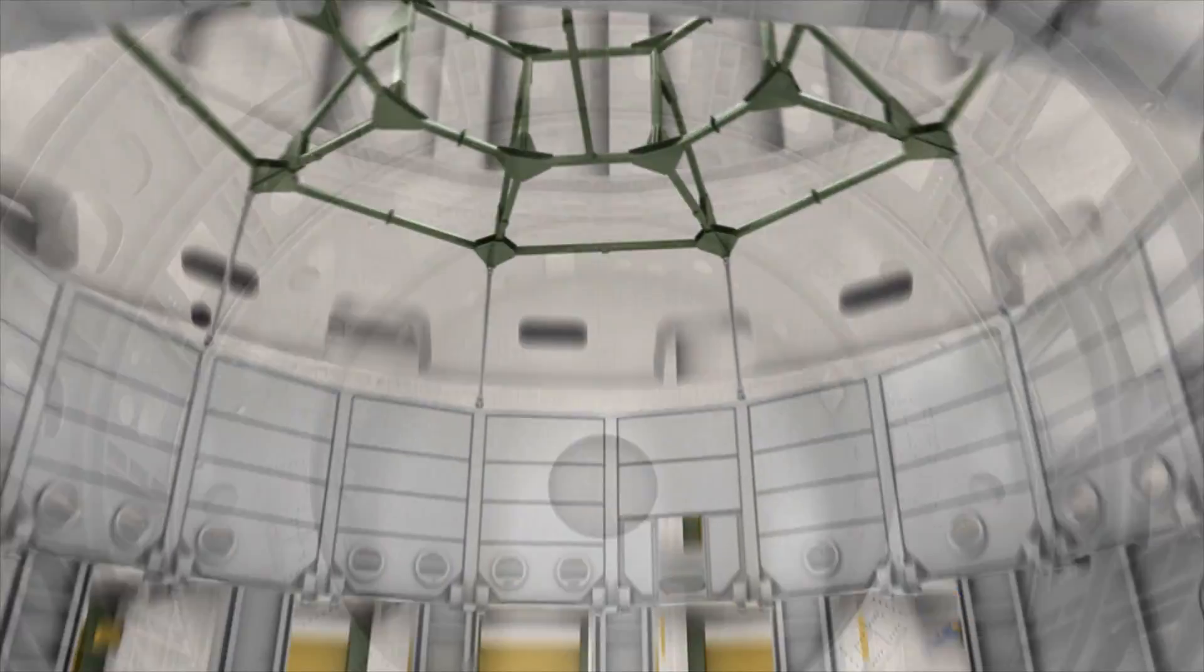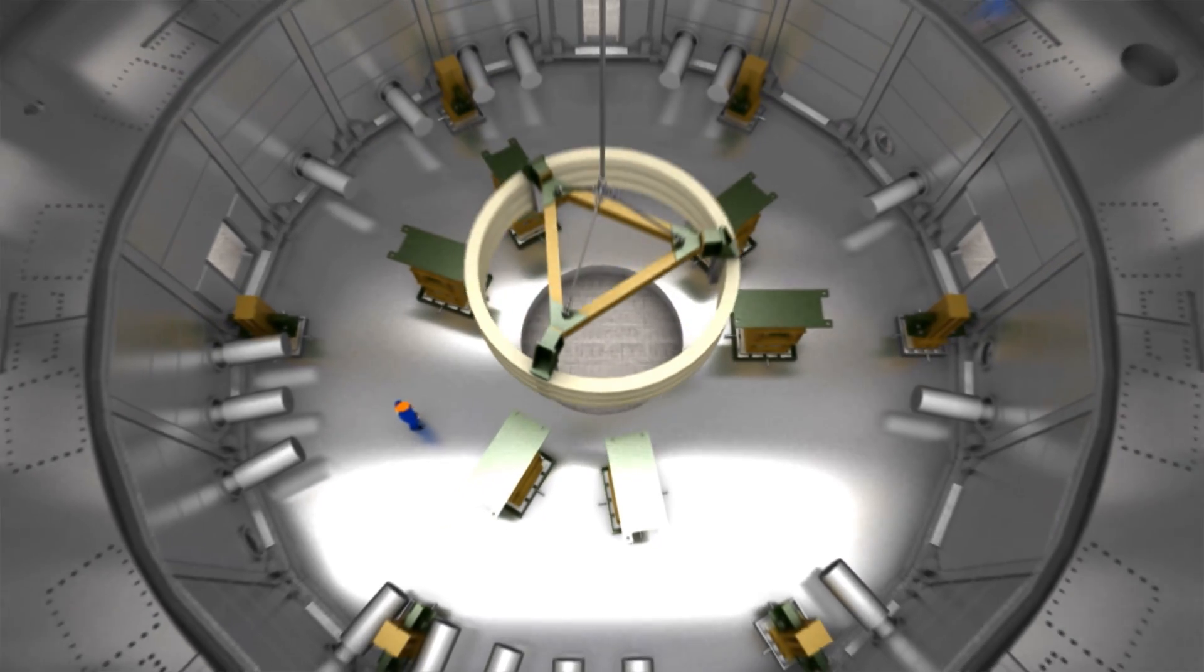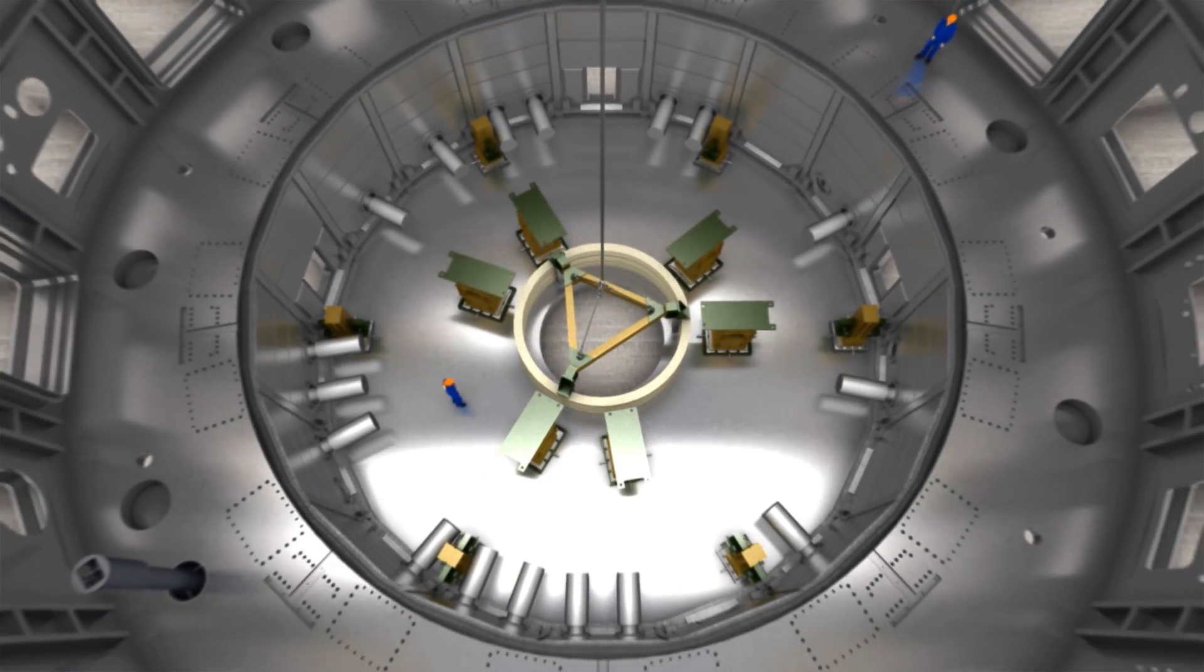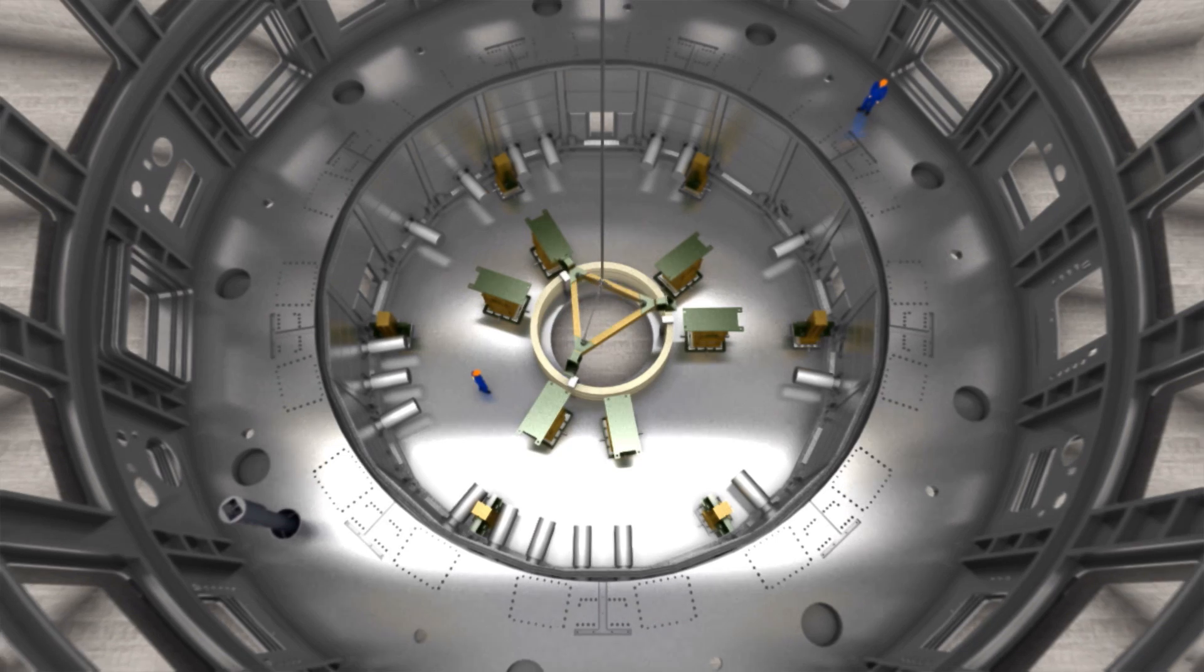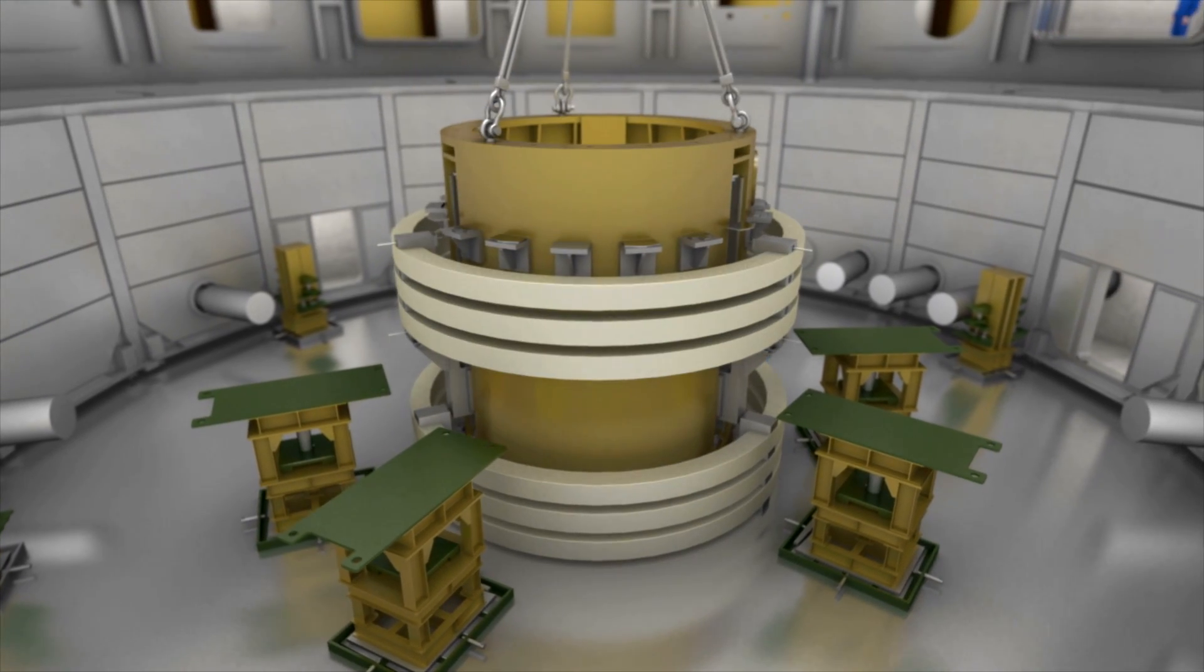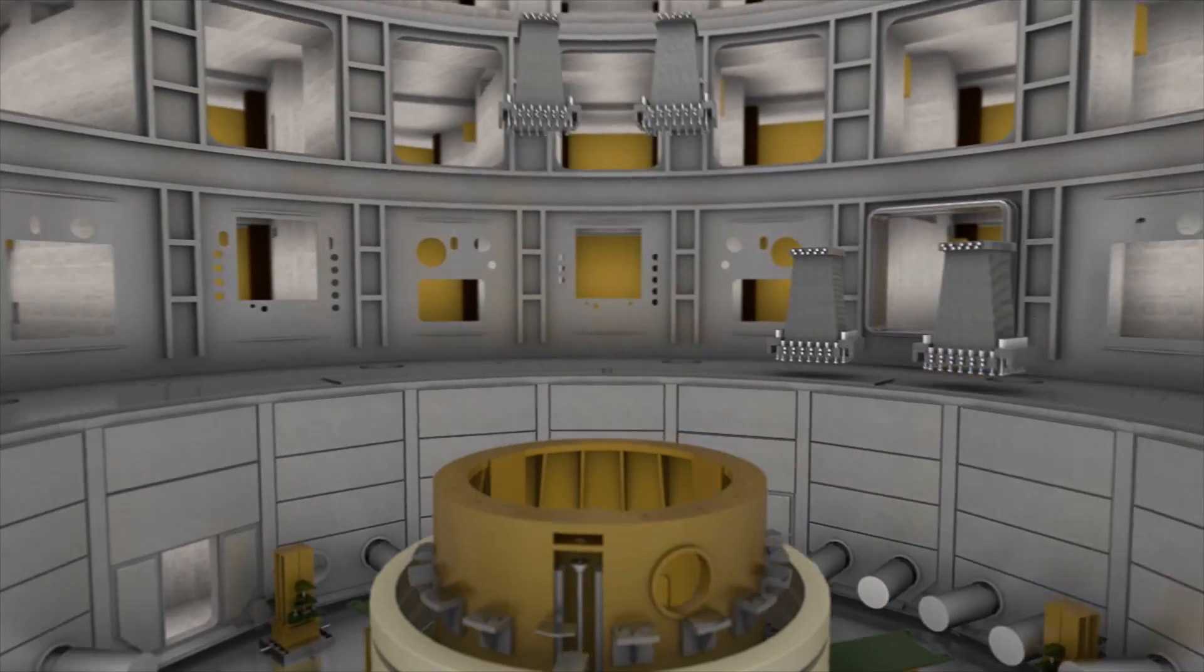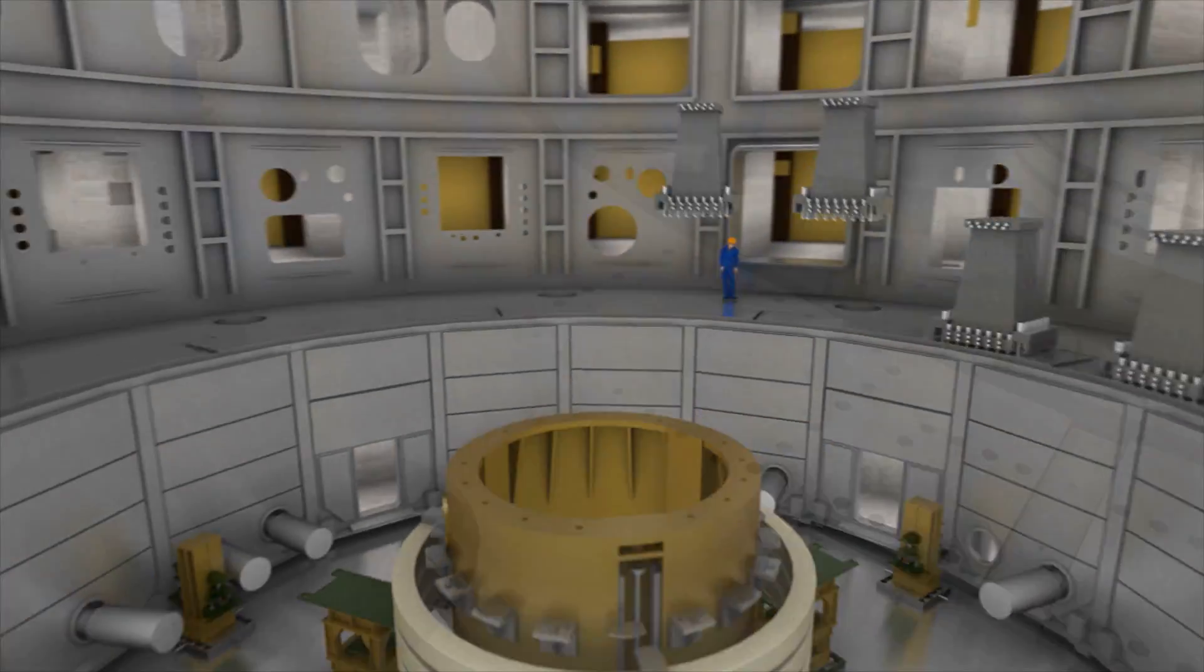Machine installation will continue with the lower cryostat components, the lower thermal shields and the temporary support structures for poloidal field coil number 6. A set of spare pre-compression rings are the next in line, followed by the central support structure and the 18 gravity supports for ITER's huge toroidal field coils.